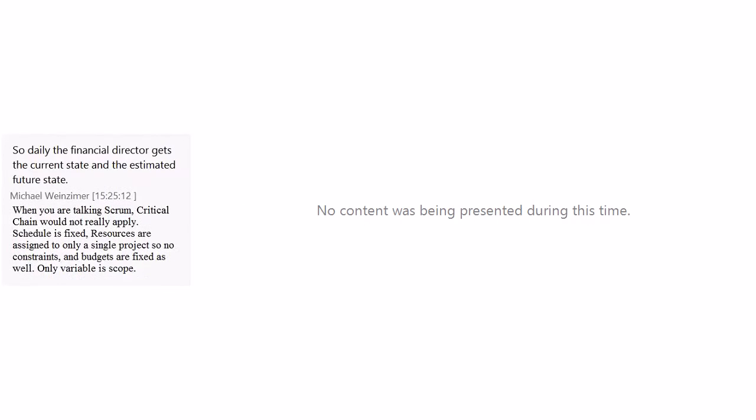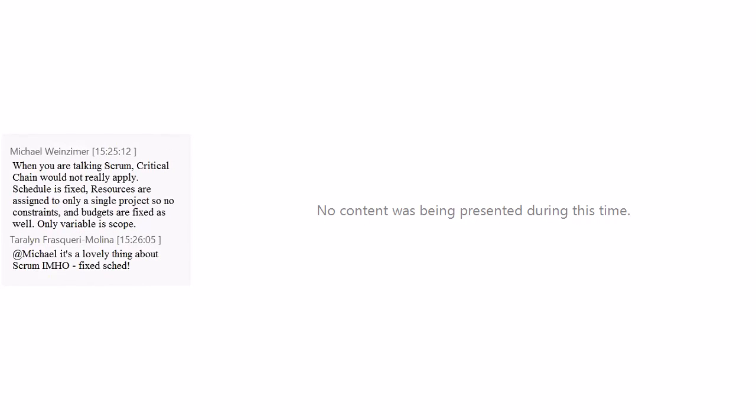One of the problems, though, is that if you're looking at introducing new projects into a pipeline and you want to know the staggering without having to go in manually to see if you have the resources for each project you're trying to work on, an automated staggering suggestion, by comparing the constrained resource amongst multiple projects, is what critical chain offers. And there's a number of companies that already do that with standalone products, but I haven't seen any of them do it with PPM yet.